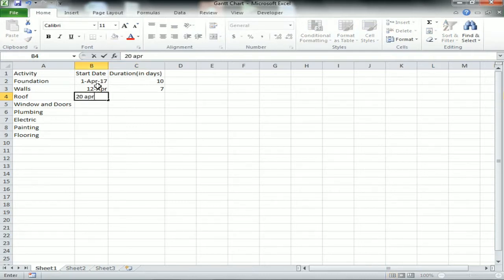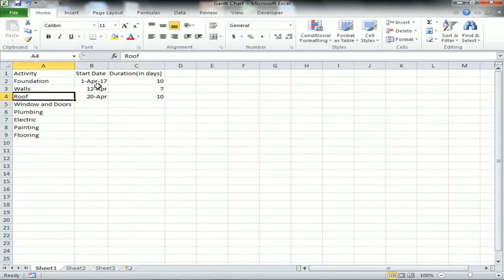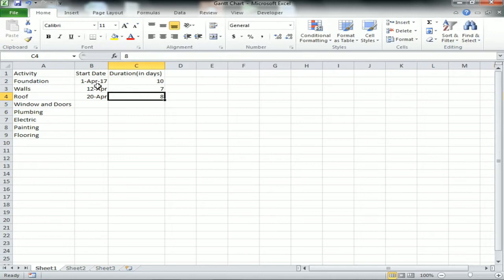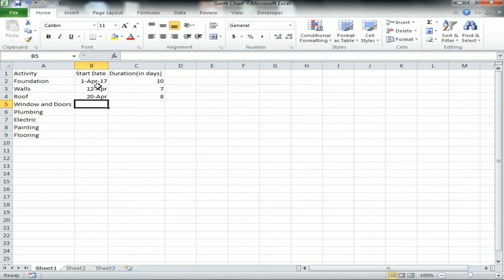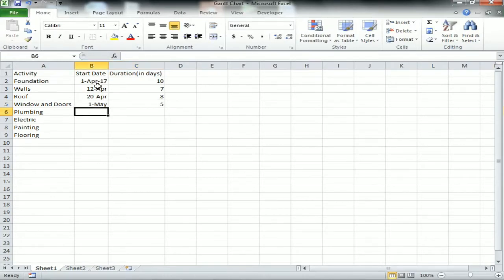Similarly for Roof, from 20th it will take 10 days, or we can reduce it - let's say it will take only 8 days. And similarly for Windows and Doors it will start from first May and will take 5 days.